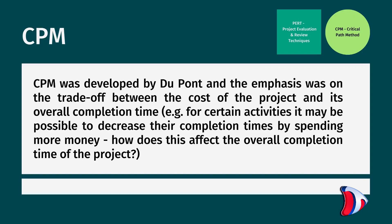the trade-off between the cost of the project and its overall completion time. For example, for certain activities it may be possible to decrease their completion times by spending more money. How does this affect the overall completion time of the project?